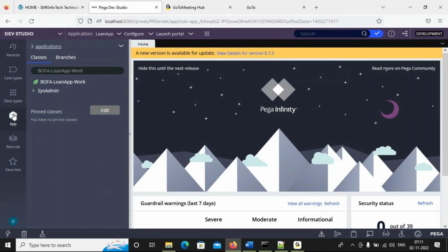For example, 3 points, 5 points. For each point, you can consider it should be 6 to 8 hours. Each point should be 6 to 8 hours. For example, 3 points should be about 20 to 30 hours. So that will decide the points. It is easy to talk about that instead of saying 30 hours; we can say 3 points. That should be easier for us, right? 24 hours is a high number, while it is 3 points. So we need to give an easy terminology for everyone.